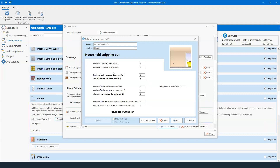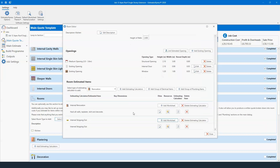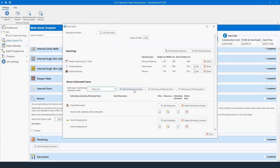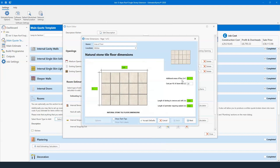For internal stripping out: doors or windows to be removed, room stripping out — any wood floor coverings, fireplaces, water, gas, or electric supply to refit or decommission. Household stripping out: radiators to remove, disposal cost, bathroom suites, bathroom wall tiles, kitchen units, appliances with disposal, and how many hours to give your team. For a kitchen you might say remove 11 units, three appliances — if scrap guys don't come it'll cost 100 quid with the council — and dedicate three guys for one day, 24 hours of work.